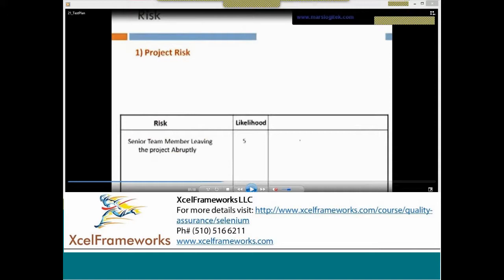See, already you planned 10 hours. Take the previous example, the draw feature. That guy came up with the test case and everything. But the next day, he suddenly put in his papers and he's not there, leaving the company or even going on vacation. This is a risk for you, right? You plan something, that resource is not there, then how can you deliver the build? You can't deliver, or if you want to deliver, you need to plan for that.